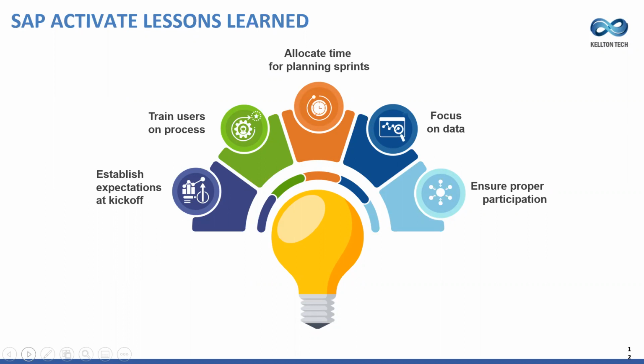And then what ends up happening is when they see the system, when you're doing SIT or UAT or whatever, they're surprised, or they didn't exactly understand what they approved back in blueprinting. And now what happens, right? You're trying to make the changes and it's very expensive. Change requests are created,